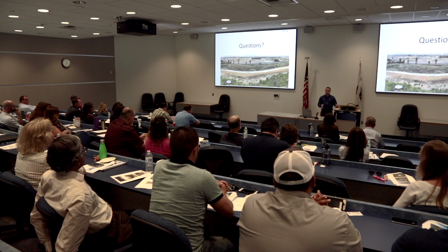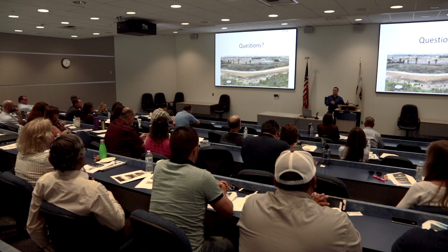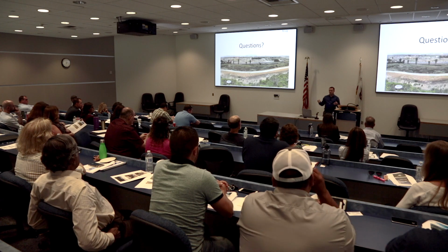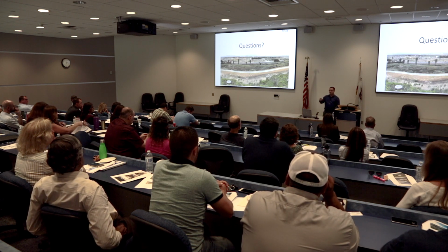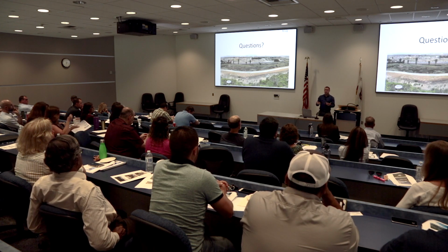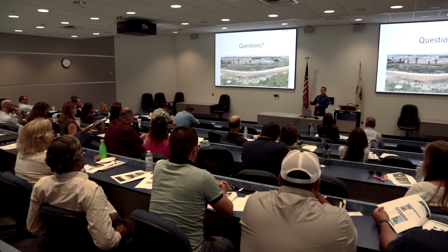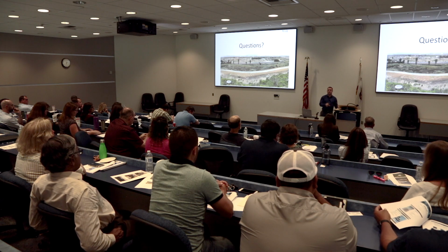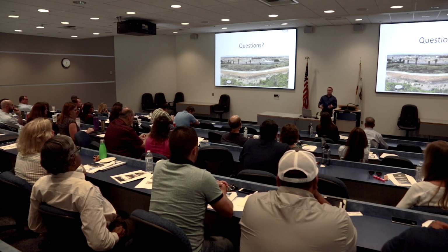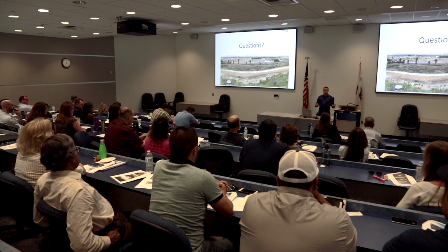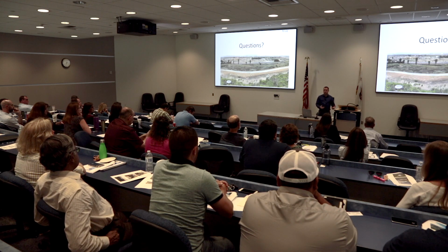And the engineer doesn't necessarily know how they're going to do the phases, because it's not even in the sequence that they put on the plans. It doesn't say this is phase 1 and they're going to go phase 1, phase 2, phase 3. The way the developer ended up doing the phases was like phase 8, phase 10, phase 6. So for the engineer to try to prescribe that, there's no logical reasoning for him to be able to do that, other than maybe the sequencing if the developer was going to do it by the number order they assigned.